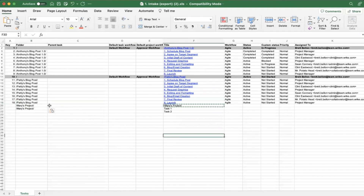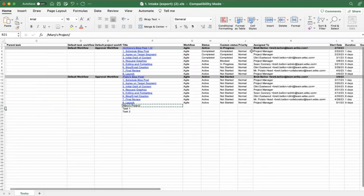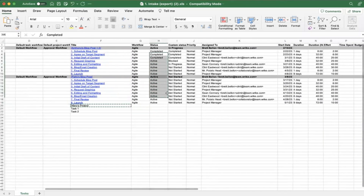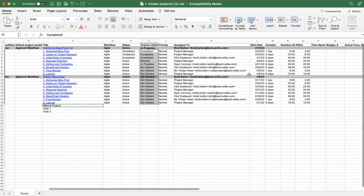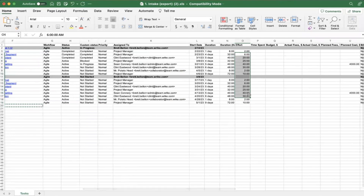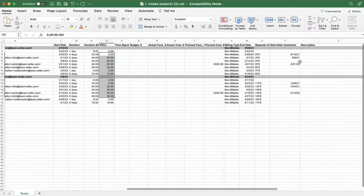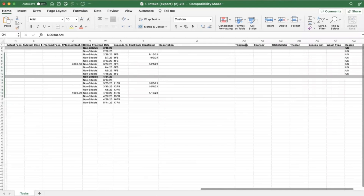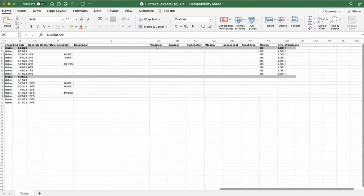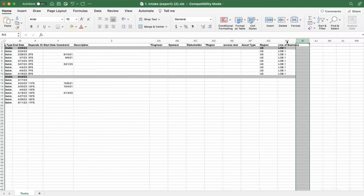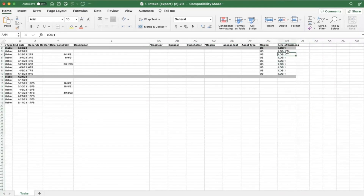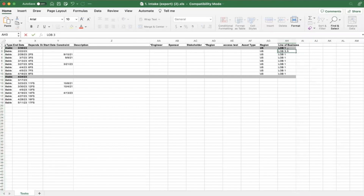It's a bit more complex, but it allows for more options and additional fields. This format lets us do things like status group as well as actual custom statuses, effort, budgeting fields, and — most importantly — custom fields. You need to have built the custom field first in your system so it exports properly. If line of business is a dropdown, pick line of business one, two, or three — the system will know only those three options are valid and will import them as a dropdown.